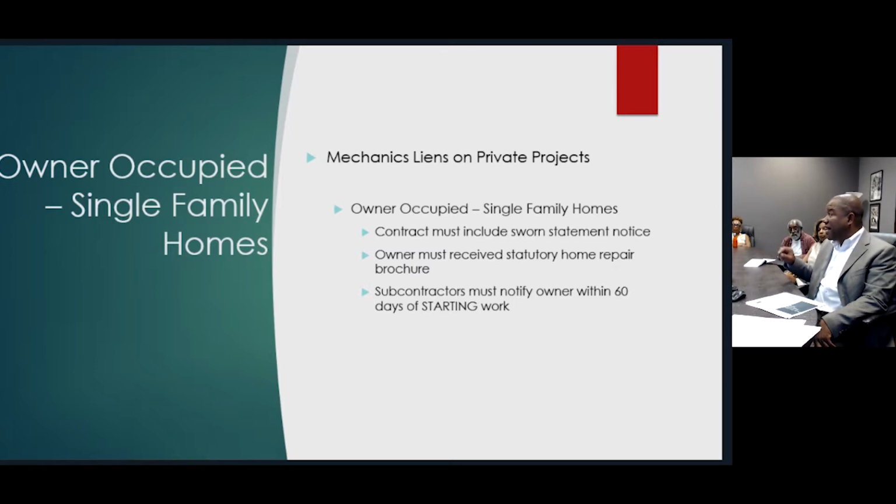If they fail to provide that information, the contract could be voided. So you could do all this work and not get paid because you didn't comply with the statute. I bet most contractors just don't realize that. I really don't think a lot of contractors even realize they're supposed to do that. Ignorance of the law is no excuse. There's a responsibility of every contractor to follow the existing law.